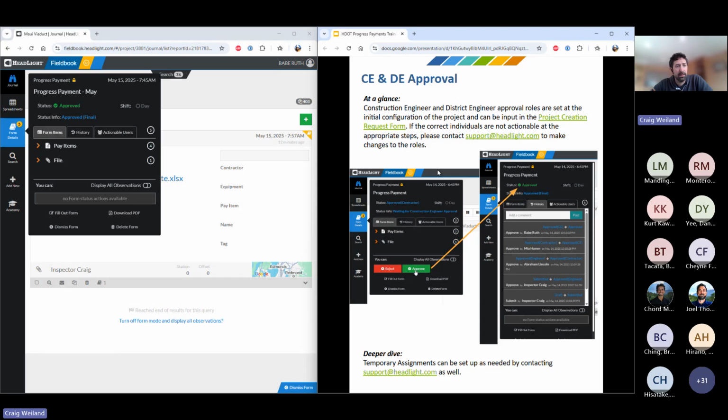As I mentioned, we're still working on additional improvements to this. For example, one thing I know we're trying to do often on your projects, you might have an automatic retention up to, say, 50% of contract completion. Right now, you'd have to manually type that in or calculate that 5% or whatever the number is and put it into your payment.